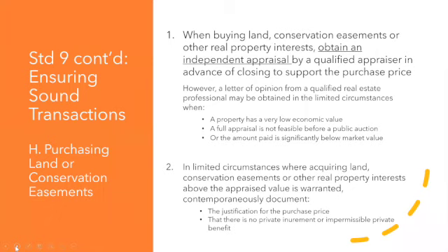estate professional, right? So if timing prevents getting a full appraisal prior to purchasing a property, if you need to snap it up, at least consult an appraiser to see if that appraiser might be able to give you a ballpark or a range, just to kind of set you in the right place with respect to where the fair